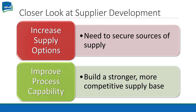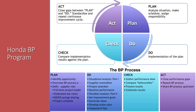One way to do this is Honda's approach using the Plan-Do-Check-Act process. In the Plan phase, they find an opportunity, overview the business process, and define the supplier's role. They'll determine whether to have a full-time project leader, a dedicated war room — basically a conference room dedicated to that purpose — negotiate a 50/50 share of the savings, and come up with a project schedule.